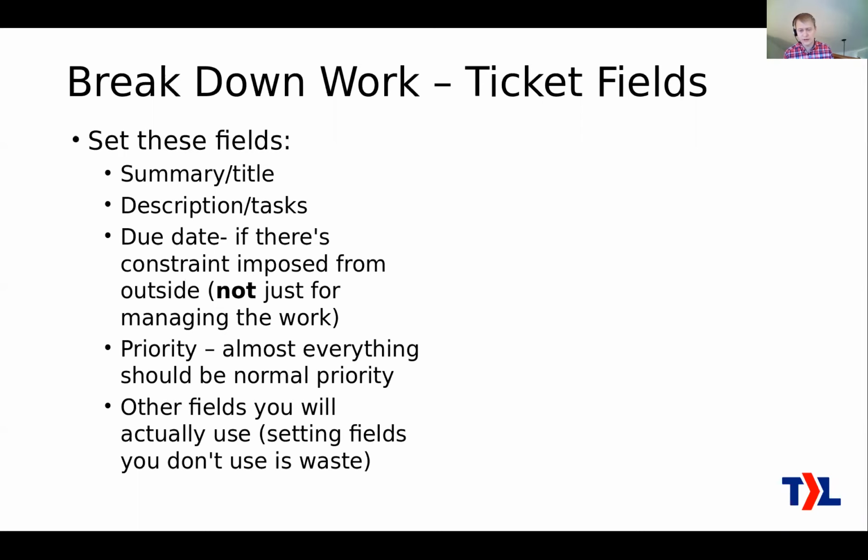scope, so that's important. The due date, go ahead and set that only if there's an external constraint, like maybe this has to do with a conference that's on a certain day, or it's a regulatory due date for some new constraints coming in. Basically, it's not just for managing work. I'm going to tell you other ways to manage the work. We don't do that with the due date, but if there is an important constraint imposed from outside, then you're going to want to reflect that in the due date.